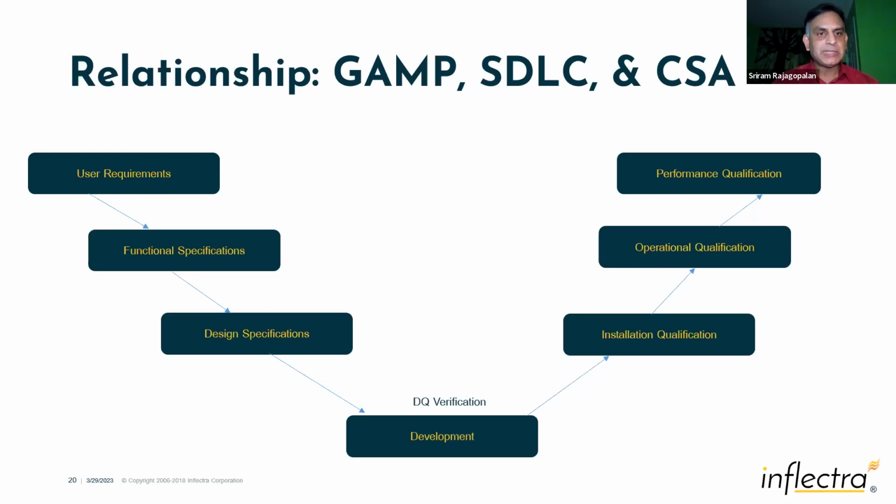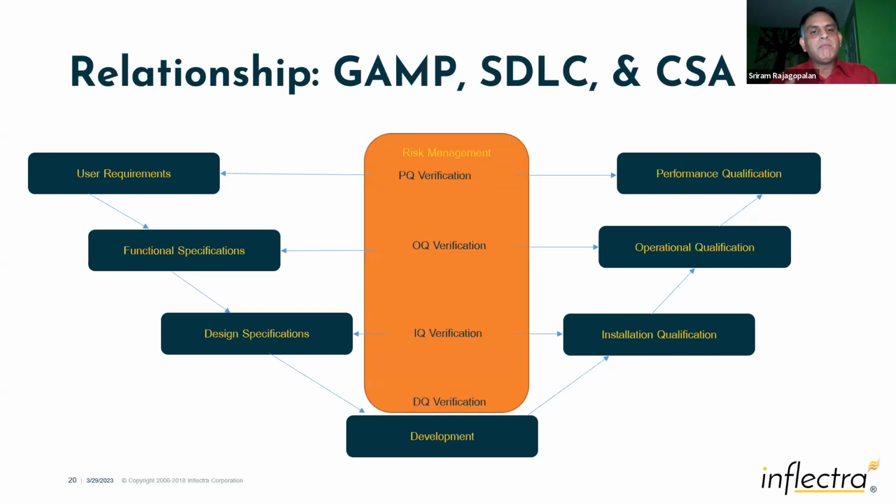This is the reason privacy is by design, security is by design, these qualities by design. So you are including these things, and then you are moving into IQ verification, OQ verification, and PQ verification. So this validation, as you move through these verification stages, is building the confidence level. As you are increasing the confidence level, you are understanding, all right, I'm mitigating my risks. So you started with the risk and you ended with, what is the residual risk that you are accepting.